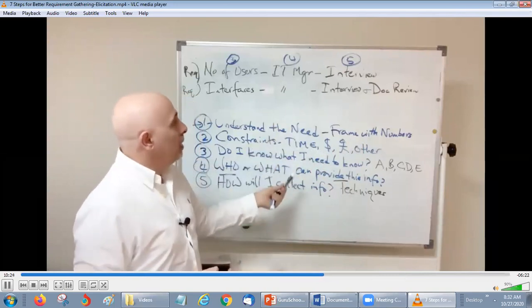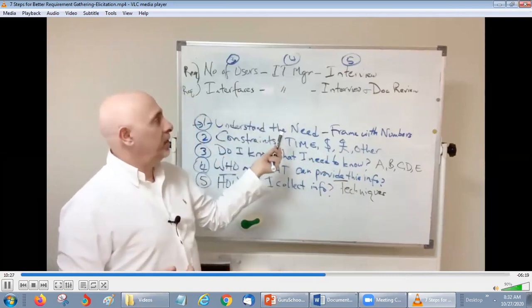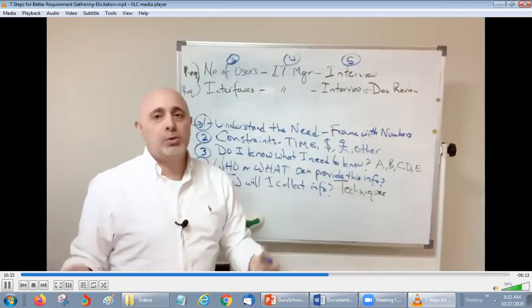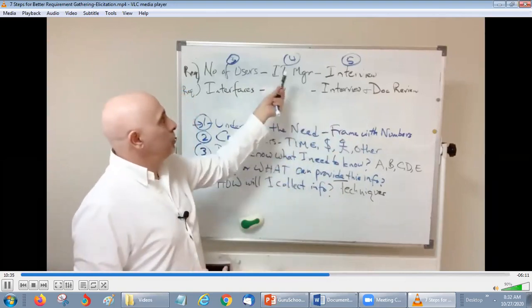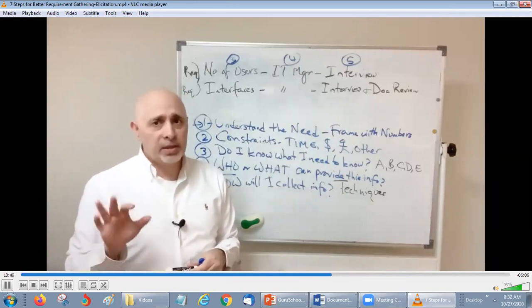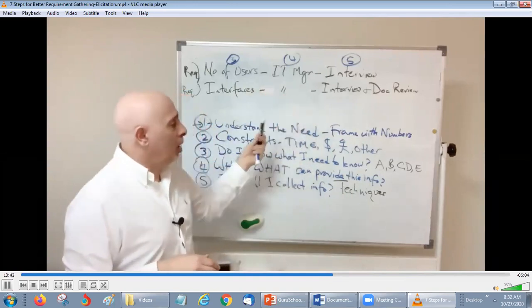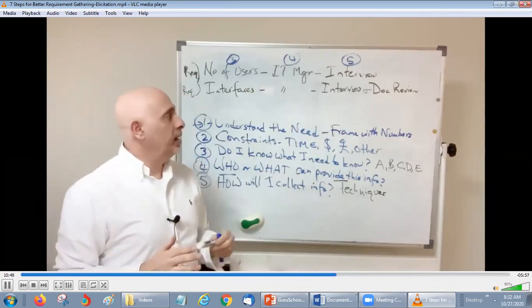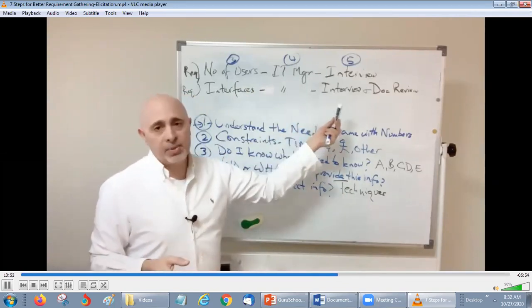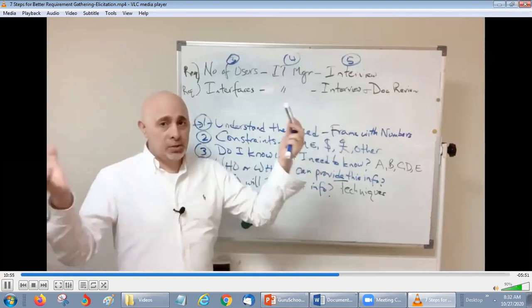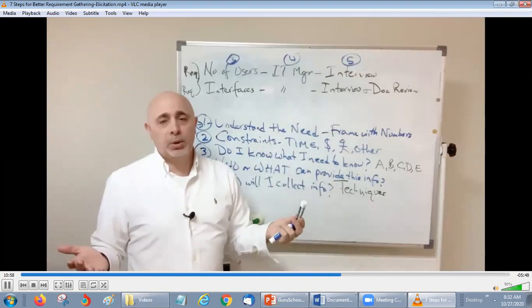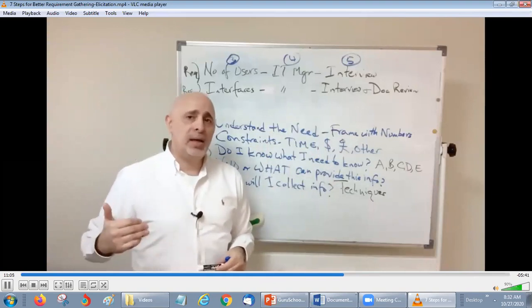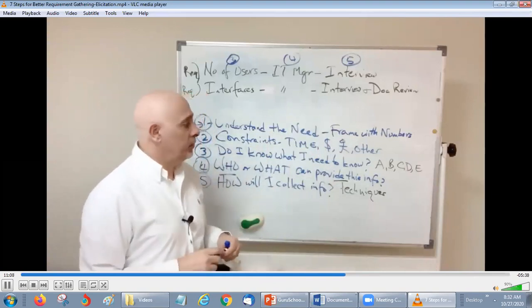So what you want to do is figure out for every requirement who or what is going to provide you this information. Take a look at them and figure the best technique from available or well-known techniques that you would use to minimize the time frame for collecting the requirements. Mind you, with regards to time frame, you also have to consider step number 2, constraints. You may have a limited time for you to get this done. And if you are really tight on time, then workshops might work much better than interviews, because you can just bring everybody there into a 2 or 4 hour workshop with some snacks, and you can just sort things out. If you have a lot more time, then yeah, interviews will probably be a good option for you to do.